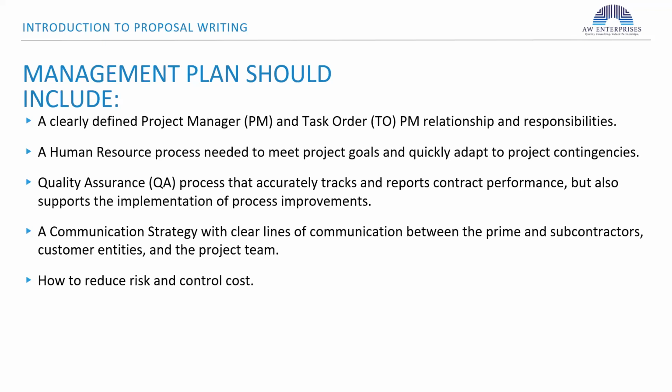Usually you're getting paid a lump sum to provide services, and you have to make sure that your procedures and all the requirements needed to fulfill this contract are included in your pricing.